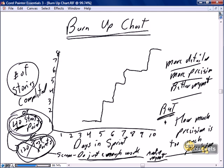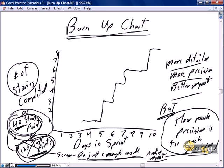If asking the team to go away and break down 40 story points into individual task points is extra work added only for the viewpoint of creating a more detailed burn up chart, I would suggest going to the task point level is inappropriate because we're adding management overhead. And if there's one thing that is not Scrum, it's adding in management overhead. If you don't automatically have task points as part of your standard operating principles within your Scrum sprint, I would suggest going to the task point level is a degree of extra work that may not be consistent with being effectively Scrum. But I think you always have the story points as part of your estimating process, so I would tend to always go with story points as opposed to stories.